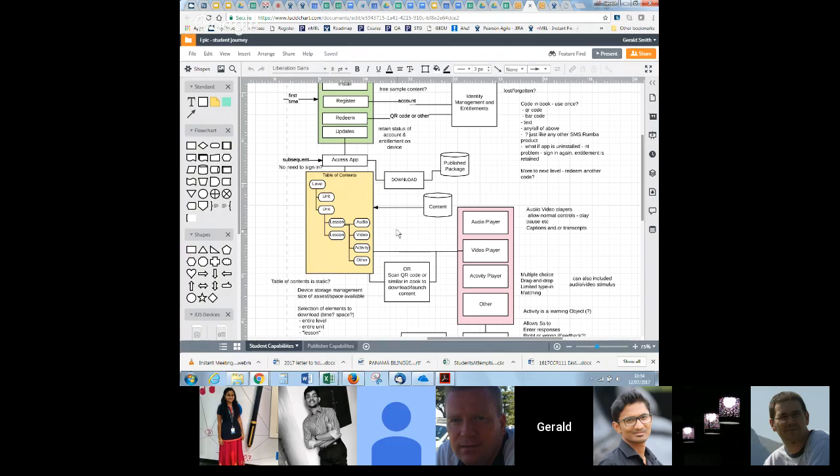I think the real reason we want to concentrate on the Reader Plus thing is because we have this big dependency in terms of the content creation. The reason to prioritize that, to state the obvious, is that we can actually then establish that, yes, this is what we want to go forward with, and then the content creation teams, publishing teams, can actually get their head round what they need to do to provide that content in that format. I think that's got the bigger dependency.